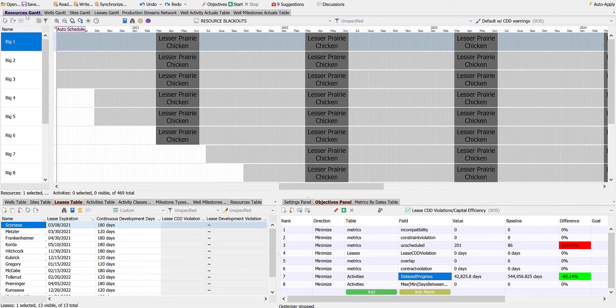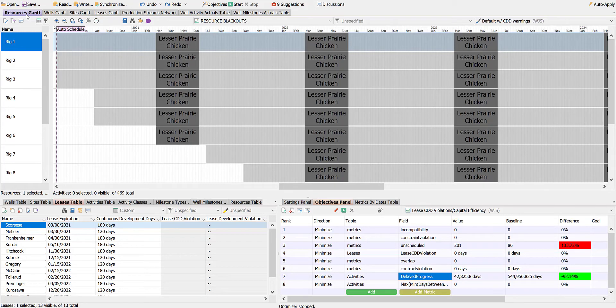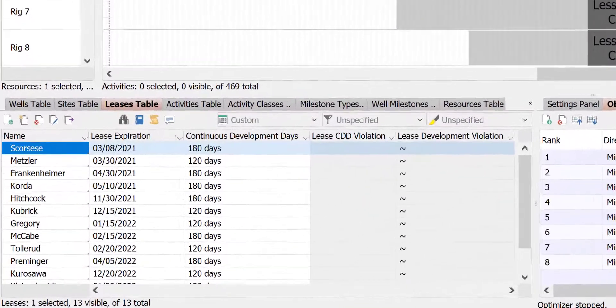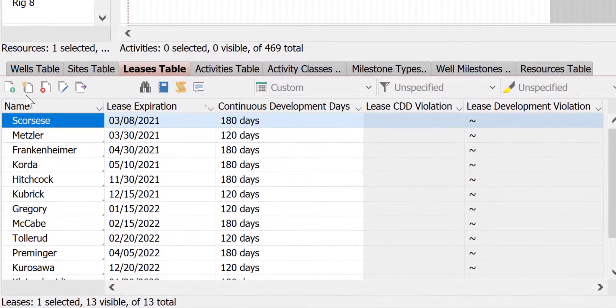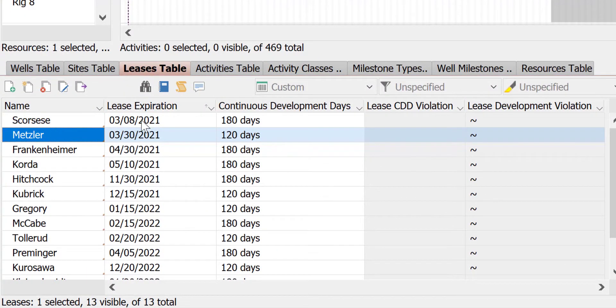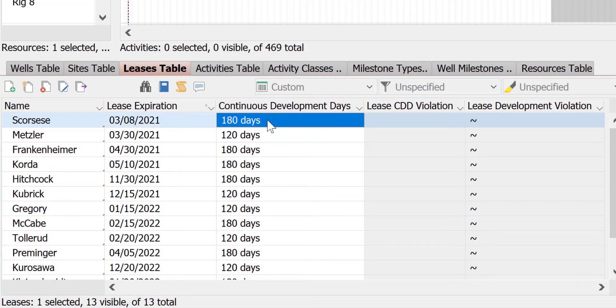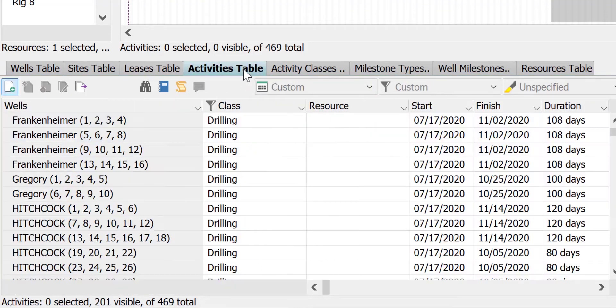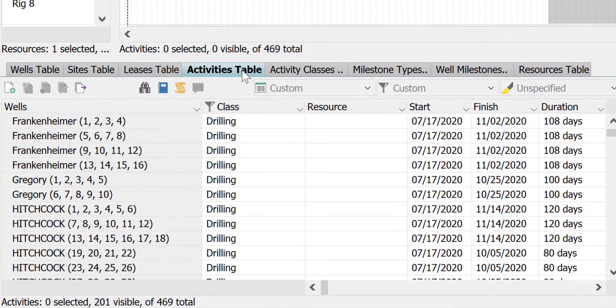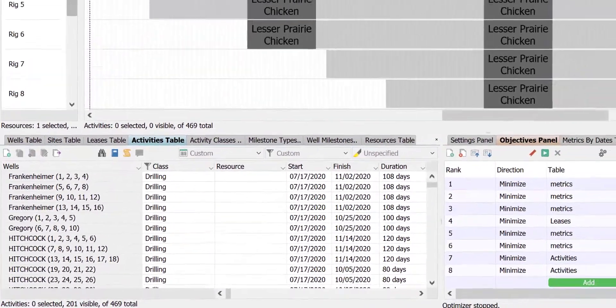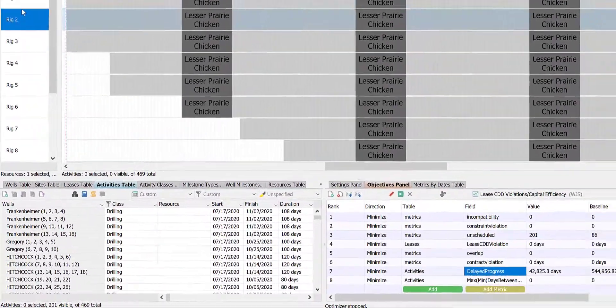DSO Upstream can use available lease and unit information to accommodate provisions like this. We'll use an example schedule with 13 leases, each with different expiration dates and continuous development day or CDD intervals of 180 and 120 days. There are 67 drilling activities to be performed and increasing to 8 rigs available over the first two years of the schedule.